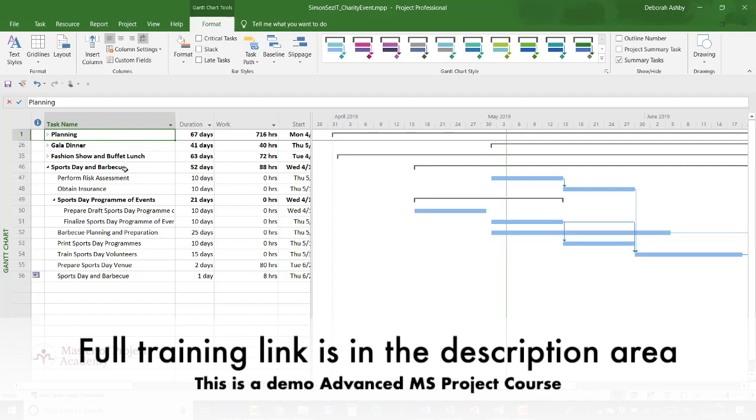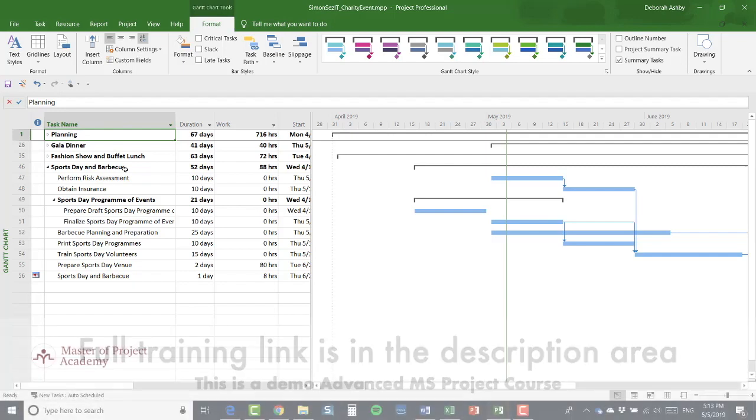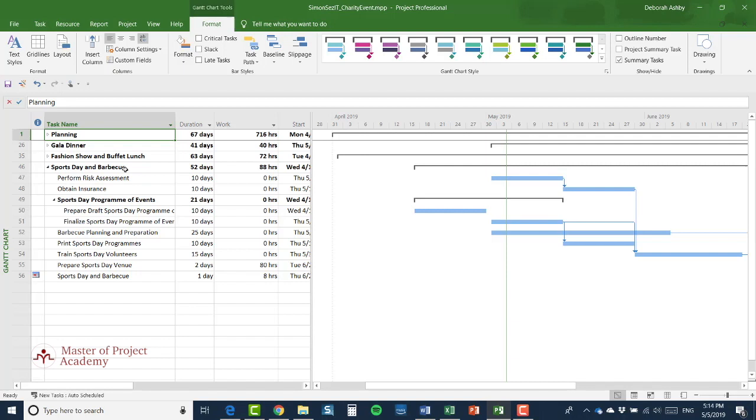So how do we make sure that those people are not over-allocated? The way that we do this is to set up our 4 separate projects so that they share resources. Now the added complication here, and again this is quite typical, is that the 4 projects, although we want to separate them out, are not independent. These projects have various links between them, and we need to make sure that these links are set up correctly, understood and respected by all of the projects.